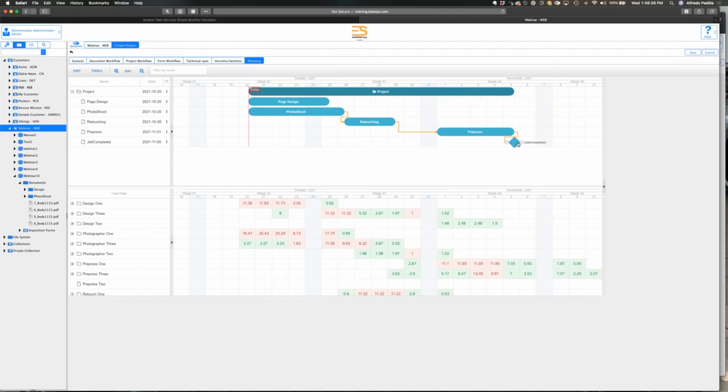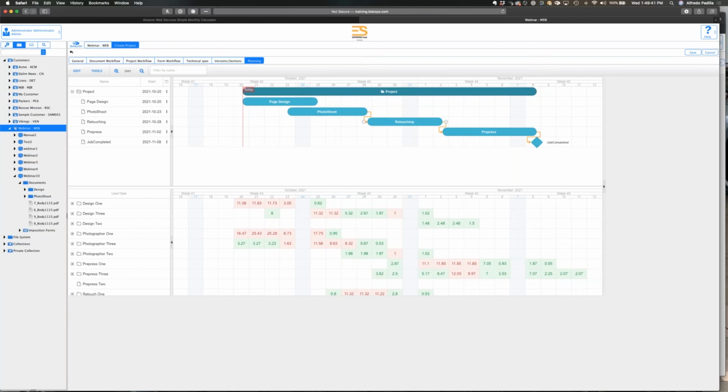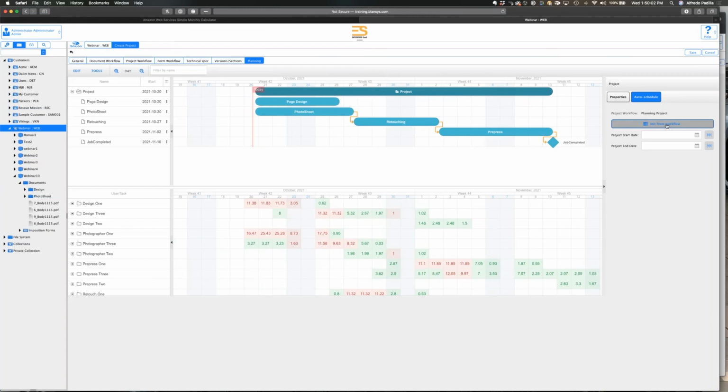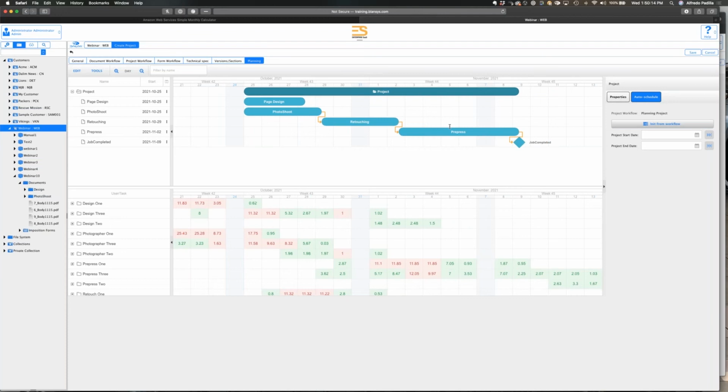One, I can just drag them if I say that's not going to start until then, or I can drag the whole project over and change the whole timeline of it. I can also do that here, where I can change it on the auto schedule like I did before, where I did a start date and then reset everything based on that. From workflow it just refreshes it and sets it the way the workflow's got it set to be set. So I just reset everything back to today and moved everything. And so if I want to move things around again, I can do that.